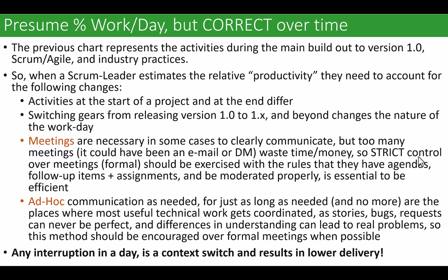And when they say, I don't know, I say, okay, here's what I want you to do. I want you to have a Post-it note or a piece of paper or a chalkboard, whatever you want, marker board, and every time you're interrupted by a DM where someone is demanding attention now, I want you to make a mark on the board. And we'll just assume they're an eighth of an hour apiece in terms of impact. And then I want you to do that for a week, and then I want you to come back to me and we'll talk about it.